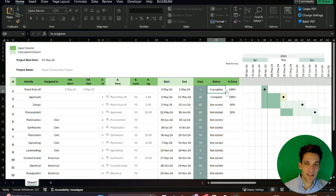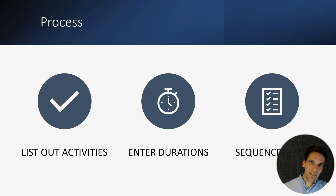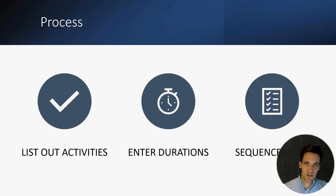And you can also track progress. In this video, I'm going to take you through how to use it and how to create a project schedule using it. You can create a project schedule in three easy steps. First, you need to list out all the activities you need to complete the project. Second, you need to work out the duration for each activity. And then the final step is you need to sequence the activities — put them in the order they need to be completed to complete the project scope.